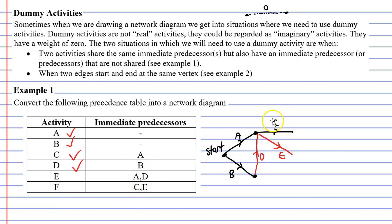it doesn't help us with activity C. We've changed the predecessors for activity C now. Its immediate predecessors are now A and D. And when we look at our precedence table, activity C should only have one immediate predecessor, A. So how do we get around this?